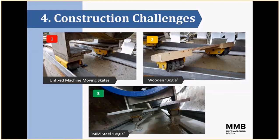The benefit with the rail system is that we managed to design each length the same, with the same bolt spacings. We made a bit of a saving in bolt manufacture for using the same design and the same rail. There was a bit of time in terms of installing the rail system, but the benefit of this was getting the pipes up, jacked in position and pushing the pipe home. In terms of programme, there was a lot more benefit with the way that we did it here. We managed to get this whole pipeline installed within 3 weeks, 2 weeks of getting these pipes pushed in and getting them jacked out.